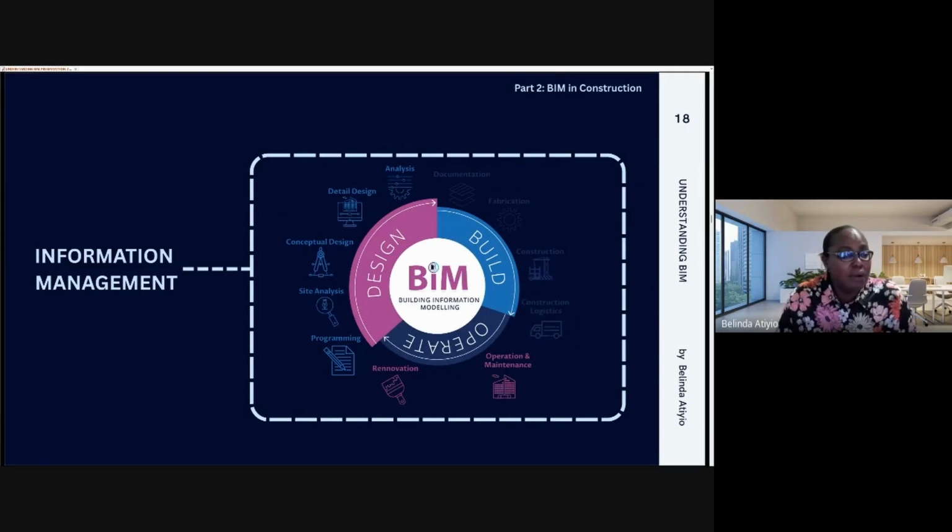But the bill said otherwise. The bill said something else. But maybe he felt that was an alternative, cheaper. Maybe I'll just buy it. And he gets to site and everybody's wondering, but this is not what we specified. And he said, that is what is in your model. That is what I extracted. So sometimes we download these things, we don't take time to check the information.